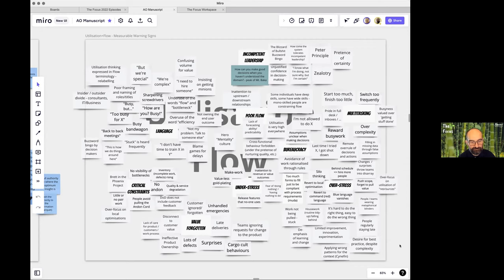Other things that we've noticed is the myth that multitasking allows you to do more. It's actually very ineffective. It gets you to do less. An organization I helped in Johannesburg many years ago had assigned one BA to six projects, and nothing ever got done because it was always context switching for this poor BA. He ended up booking meeting rooms and having fake meetings so that nobody could book time with him, so that he could actually go and sit in a meeting room and get some work done. It was really fascinating to see how this type of behavior was playing out in the organization.